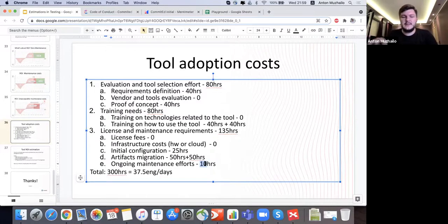It's a completely different world, and for sure it isn't used every day, but this is the estimation that usually nobody talks about. And this estimation should be performed while planning big and risky activities. For example, if in this case we put not TestLink but an HPLM solution, right? So license fees, I don't know, HPLM is $40K per year. If you convert this 40K to engineer hours, it could be a completely different picture. And return on investment we can start gaining in at least 1 year, not less. You know what I'm talking about, right? Anyway, this estimation should be helpful for you.